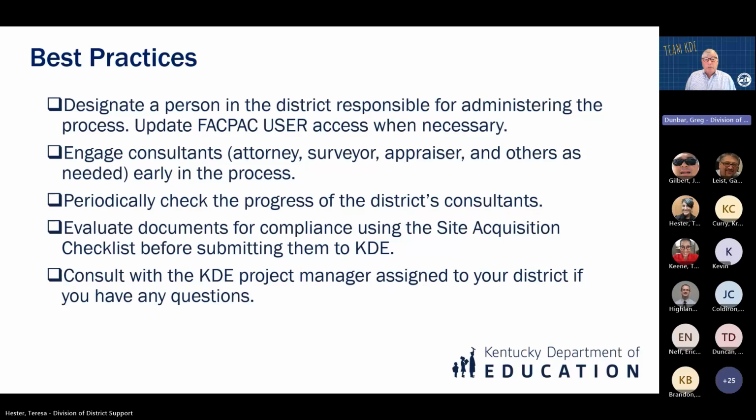Any consultants needed should be engaged early in the process, ideally upon receipt of the tentative approval letter. An attorney will be involved, a surveyor will be involved, and an appraiser will be involved in any proposed acquisition. Others may be needed, such as geotech, environmental consultants, if necessary, and so forth.